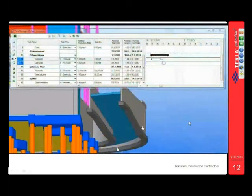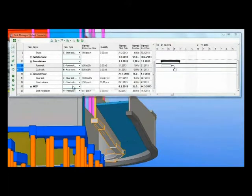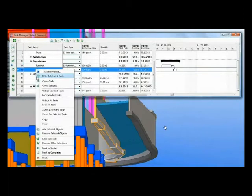Of course, another fantastic thing about when you're modeling with Tekla Structures is all the information. You can also take that and put it into a tool called Task Manager, which is more than just a time scheduling tool. It actually connects your model as you've modeled it to a time schedule. If you just follow this animation for a bit here, it shows you how we're picking off these footings, and we're going to place them into this task.